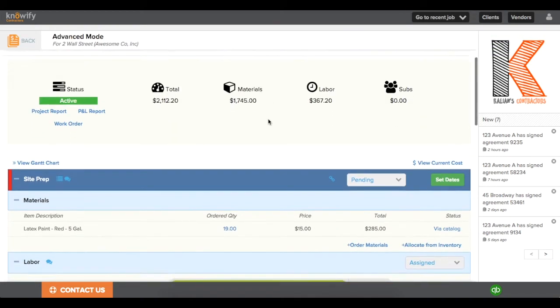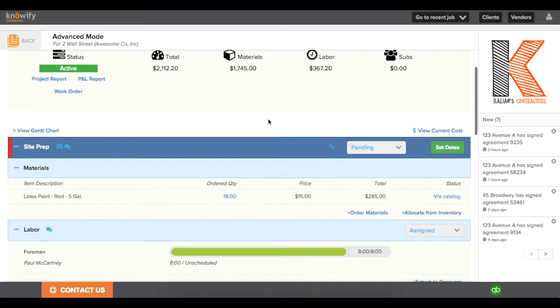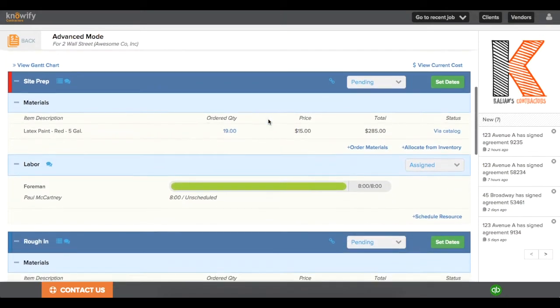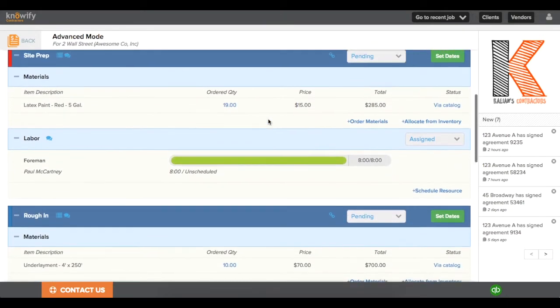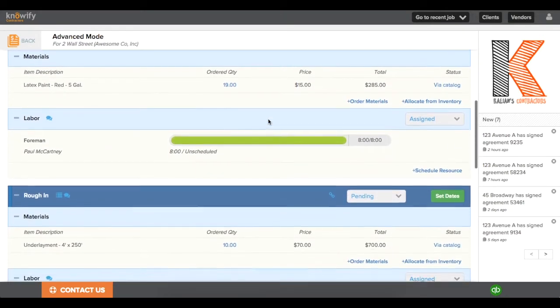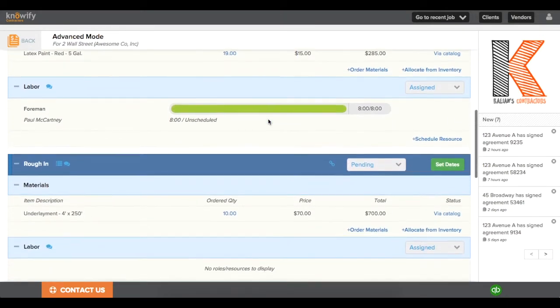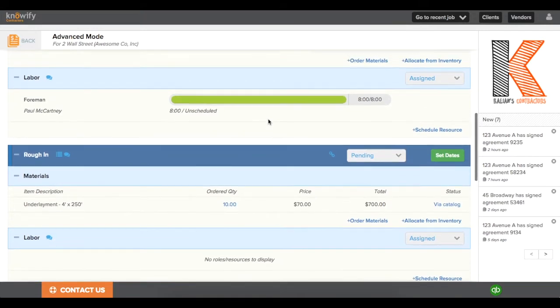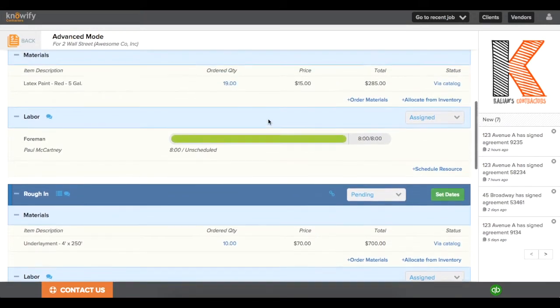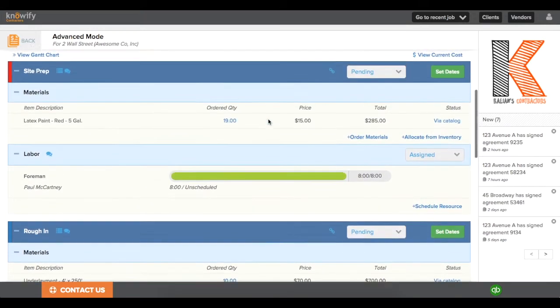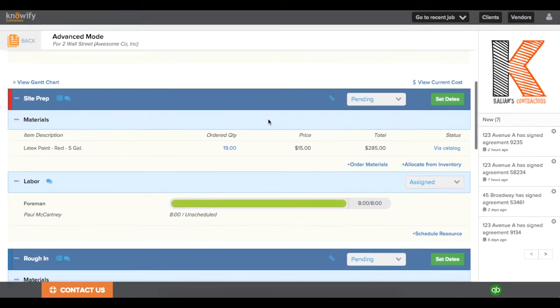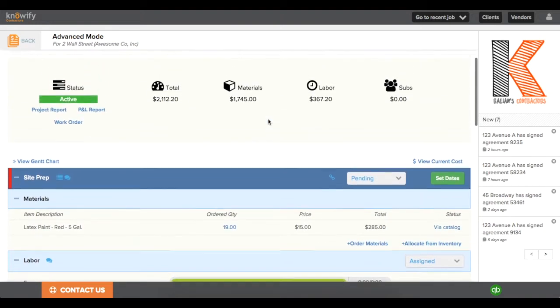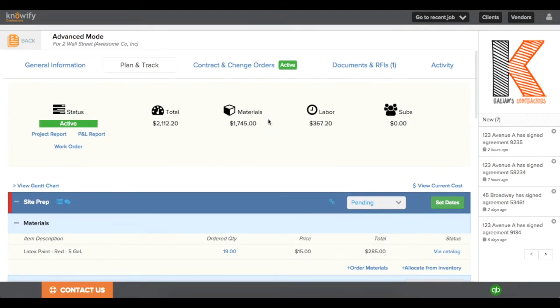After tracking costs to an advanced job, I can go back to the Plan and Track section and see how much I've spent on each of my phases individually. I can print out a project report on this as well, and it'll give me my material and labor breakdown at each phase level instead of just the whole job.